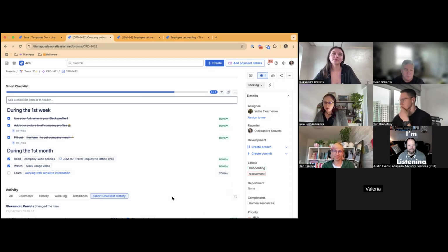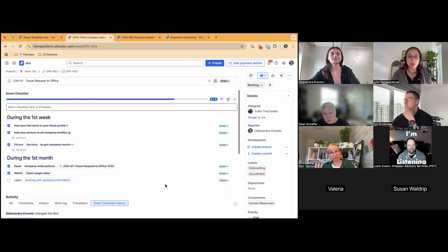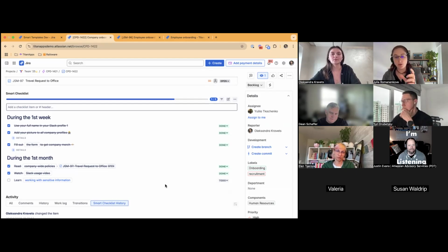I see a great question from Isaac. Can you report on the status of the checklist item? You can use JQL for that. There is no built-in reporting yet. We're working on that feature, but you can use JQL to see how many closed or open items you have in this project with a certain keyword that are, for example, past due date, because you can also assign due dates for the checklist items.